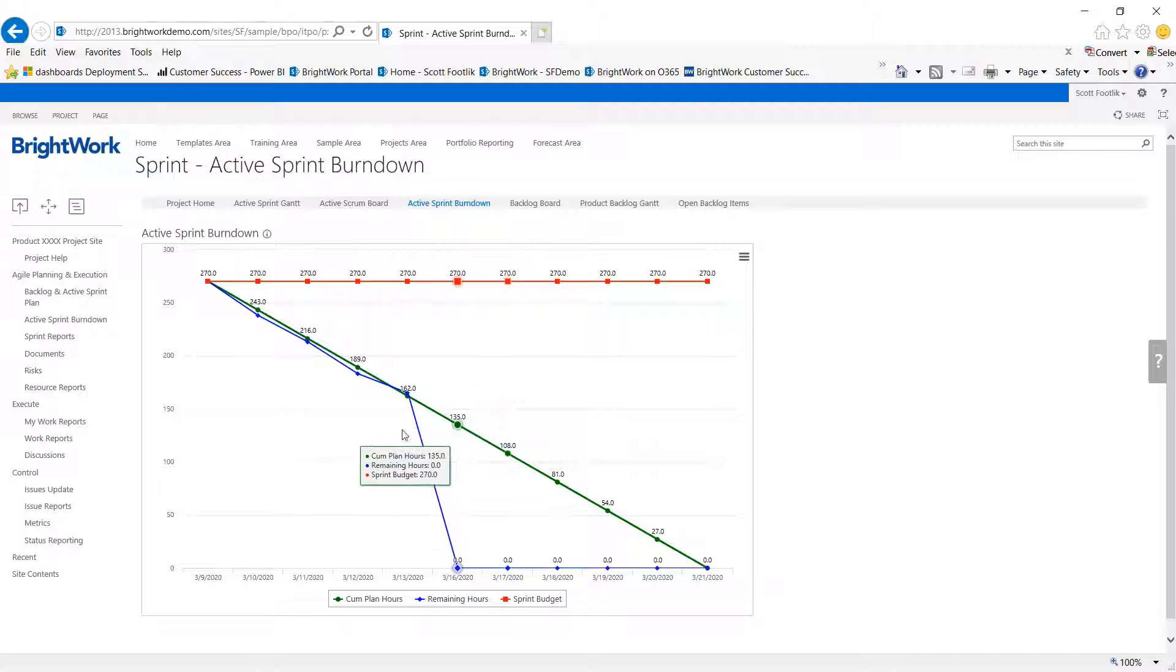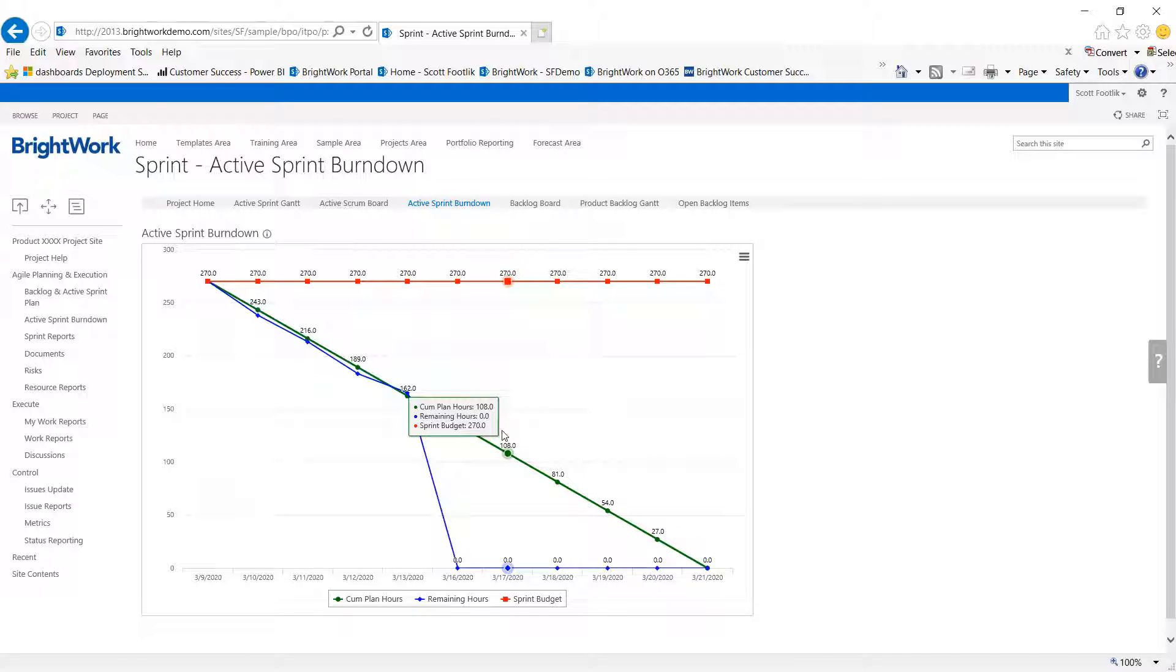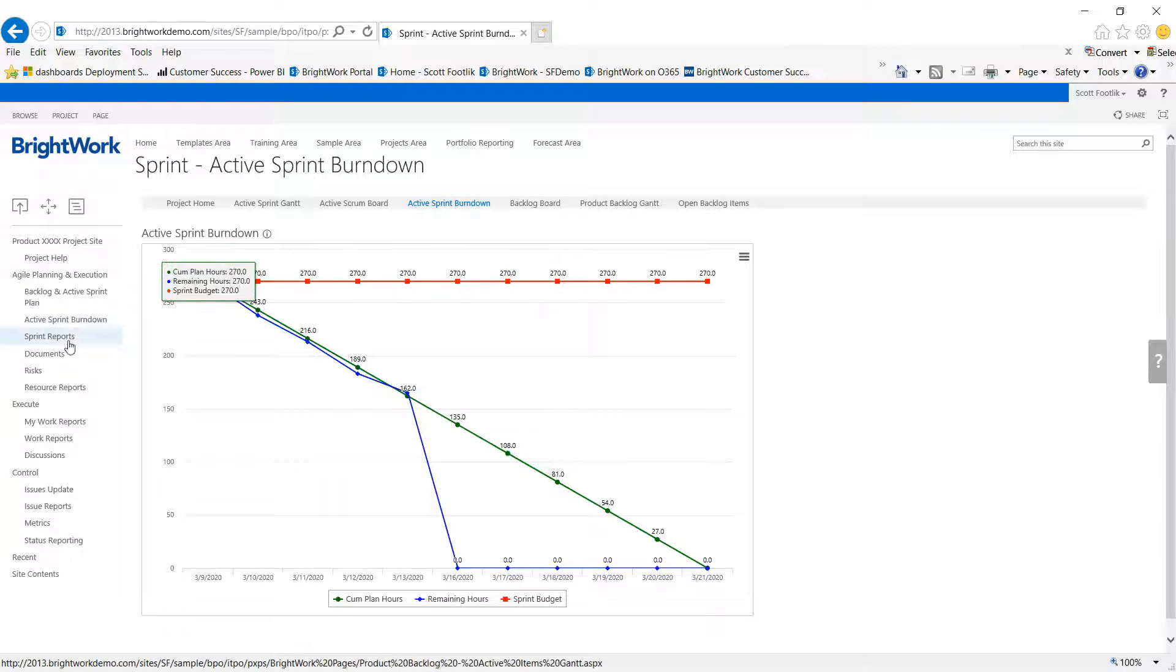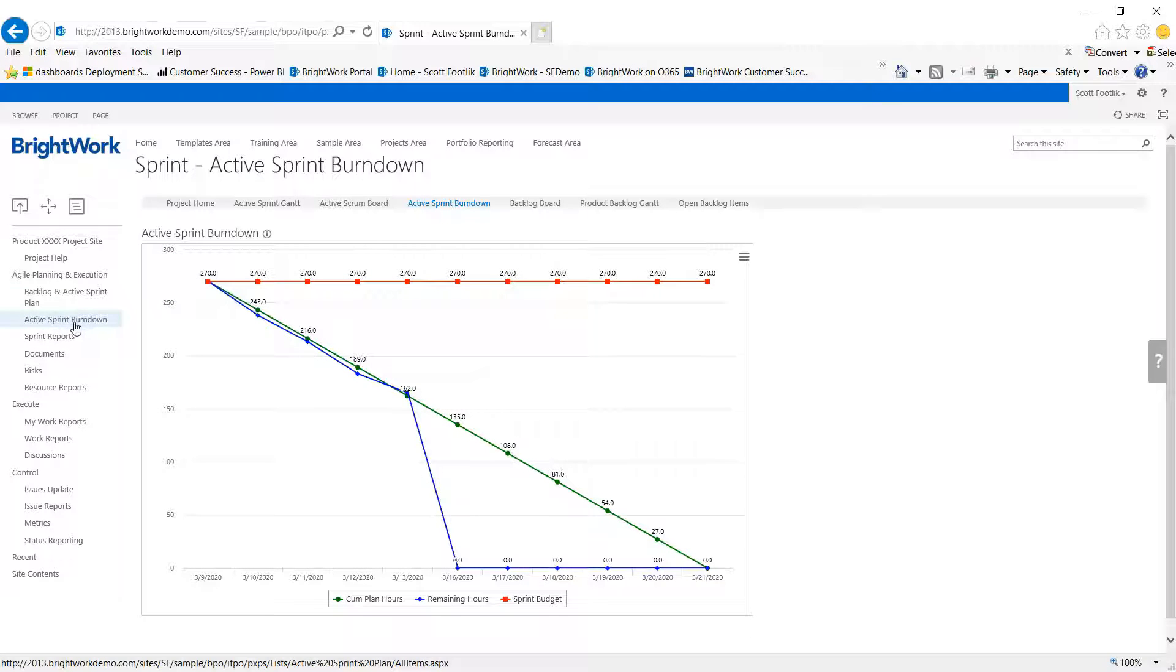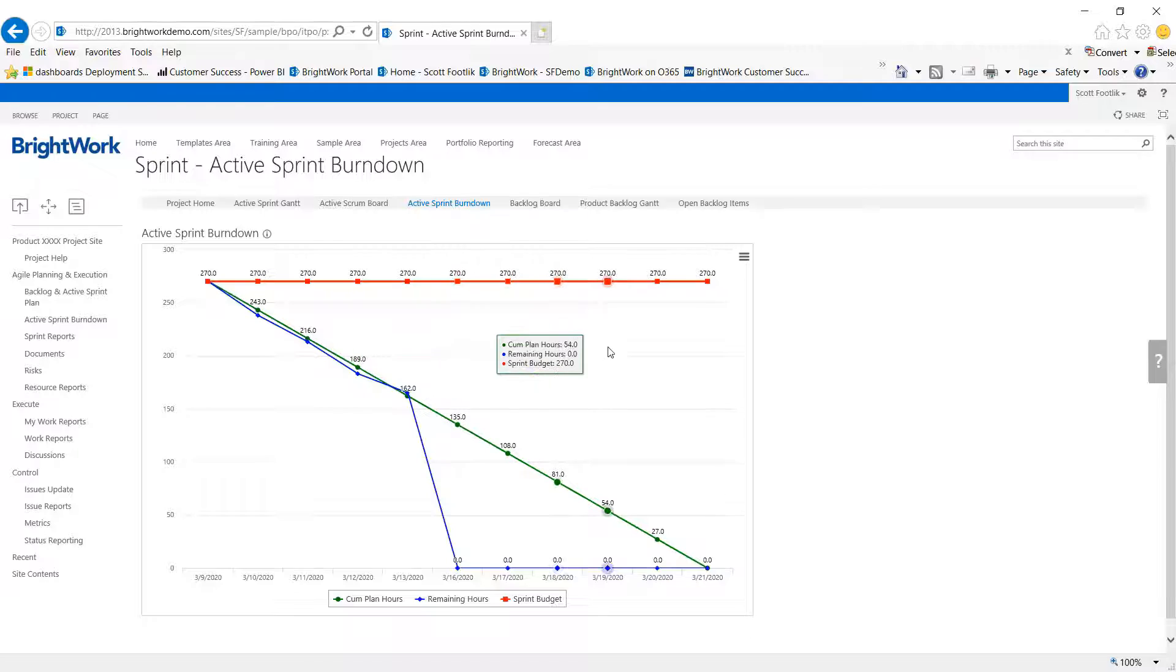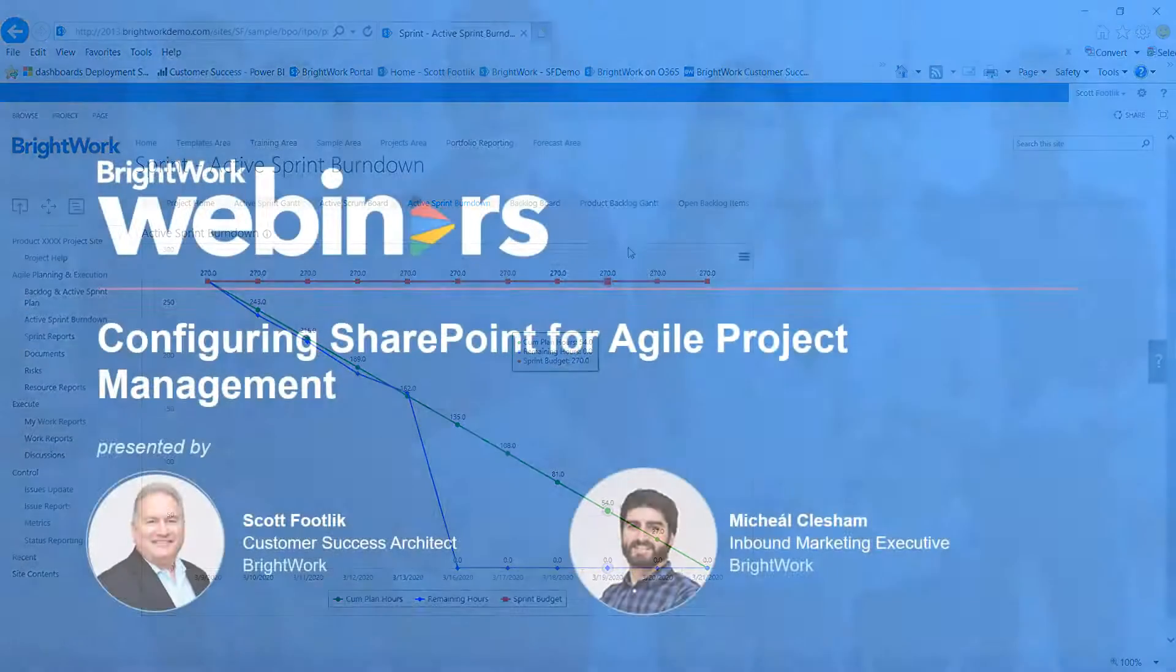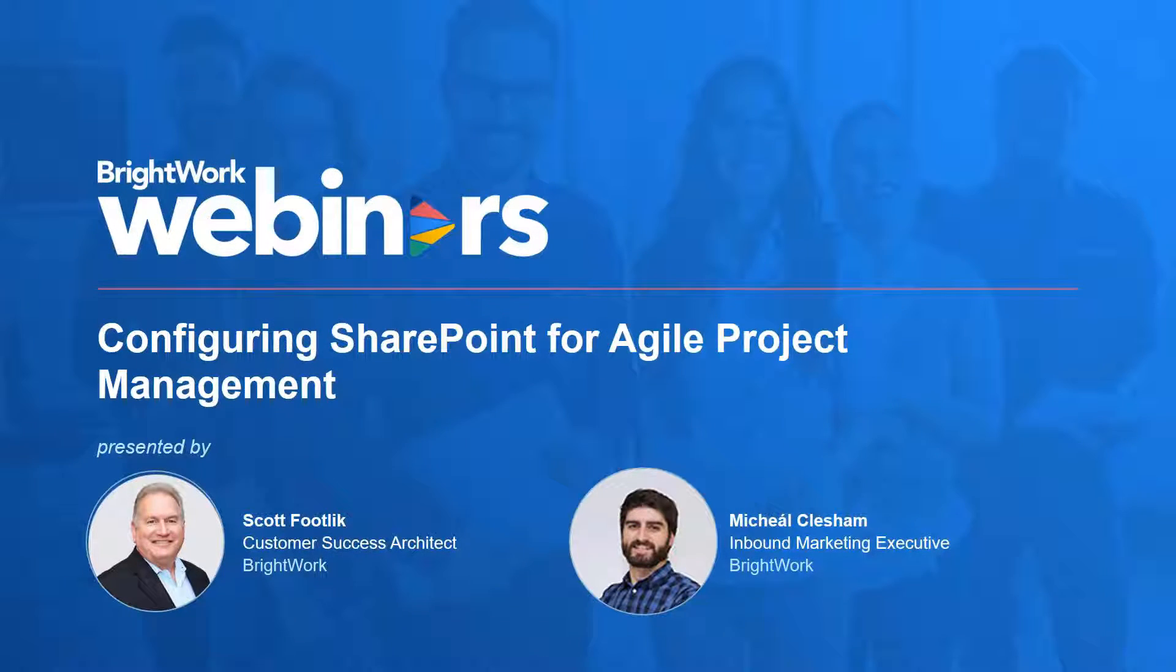So each day the iteration master or scrum master would collect the amount of effort presented and accomplished and apply it to that table that I showed you earlier, the active burndown, so that we have a nice visual picture of how we're doing.